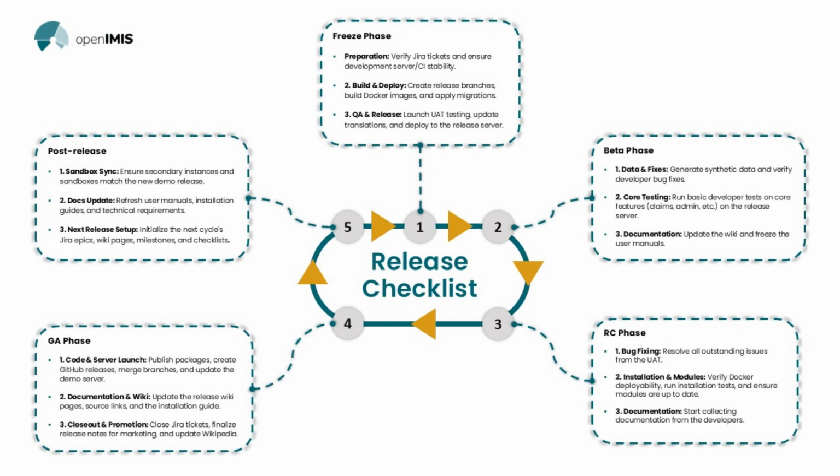where what has been developed is being made available at the testing functionality phase, where we do the user acceptance test. And for this, we usually invite different volunteers to join the community in testing. So we have the same functionalities being tested by different persons to be sure they work well and they suit the users' expectations. At this level, we equally have bug fixing, where key functionalities that are not working well, we generate tickets and they are being fixed by the developers.